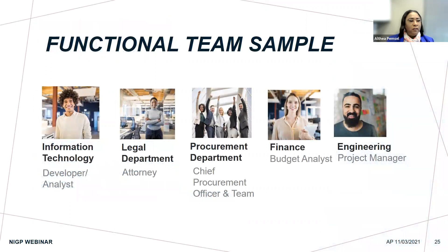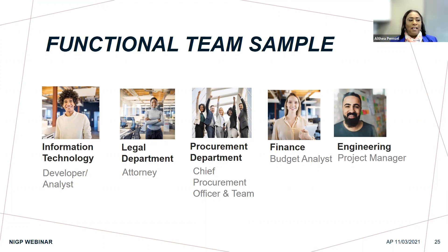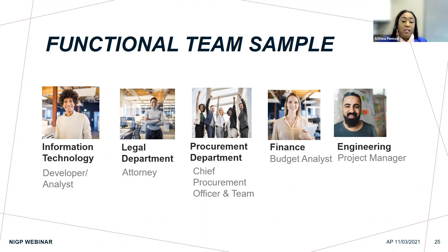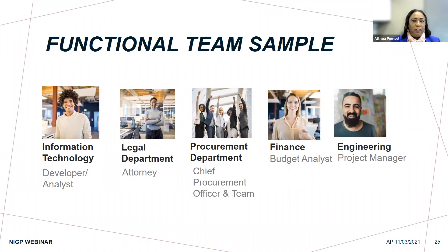Functional team — this is a great example of what a functional team should look like. These team members are not always part of every process — they go in and out. We may start with finance initially to help gather funds. Engineering will probably always be part of it. Legal will help on the contract side of things. The procurement department is there from start to finish. Also, information technology — because sometimes there are IT pieces that get left out. The building's built and then IT says, 'We didn't know you wanted this or that.' Always bring them to the table first.